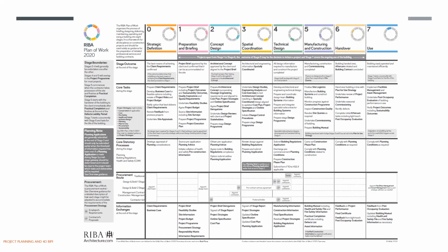In that, they prepare the concept design within the cost plan, and we finalize every breakdown and the work breakdowns during the concept design. Later we will start the tender actions, preparing the documentation and drawings, and whatever the procurement path, whether traditional or design and build or any other, we will finalize and go for the tendering actions. Once tendering is going, we will open for pre-qualification or any method, evaluate and find a suitable bidder, then award the contract to this contractor, and they will start their jobs.